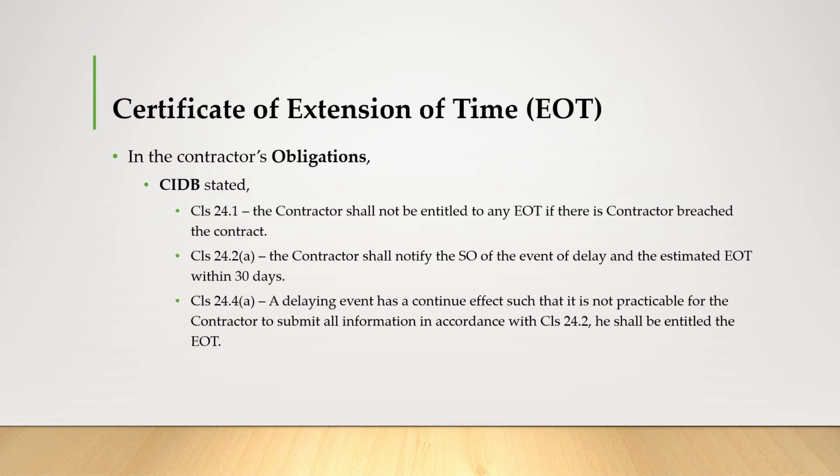In clause 24.4a, if a delaying event has a continuing effect such that it is not practicable for the contractor to submit all information in accordance with clause 24.2, he shall be entitled to EOT.